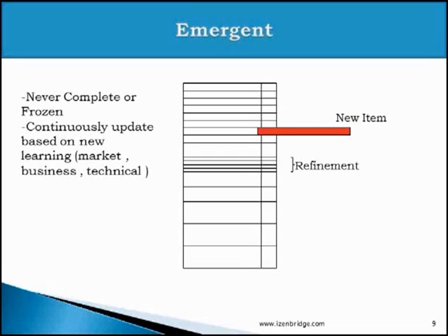But as their priority increases, if we find that the priority of a particular item is now high and it should be taken in an upcoming sprint, it needs to be refined. So the refinement also keeps happening continuously. A good product backlog keeps emerging, keeps getting new items, keeps getting refined, reprioritization keeps happening during the sprint, and we may also remove some product backlog items.